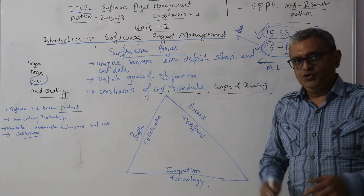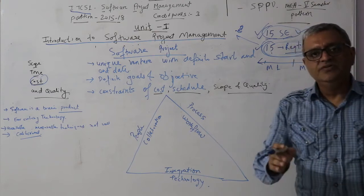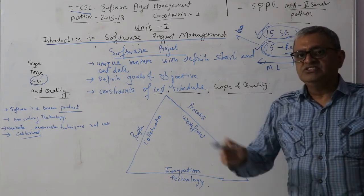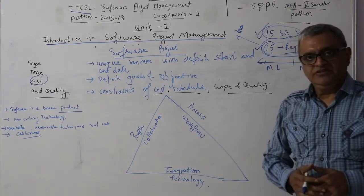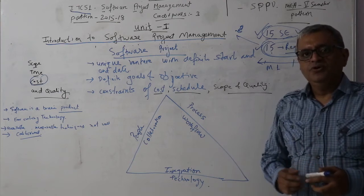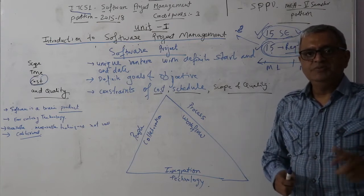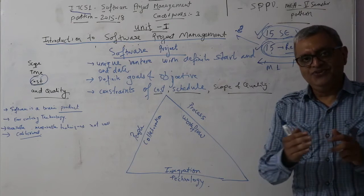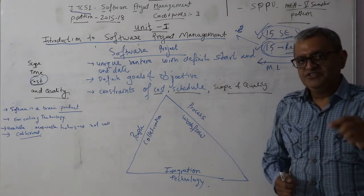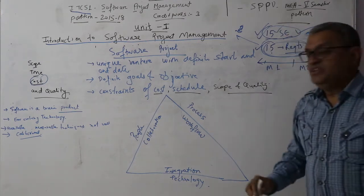Instead of 2 months, I take 3 months, use 15 software engineers, and deliver 20 requirements. But the customer says no — there is a government mandate and the software must be deployed within 2 months. That's where the problem starts: the scope has increased, but the constraints are delivering within the same number of engineers and the same timeline.